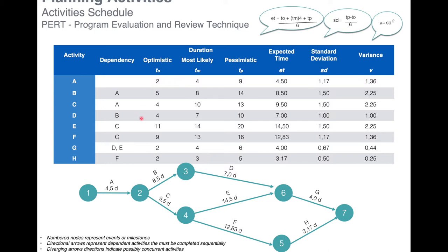We do exactly the same exercise for all activities: most likely, optimistic, pessimistic, expected time, standard deviation, and variance. Activity A has an expected duration of 4.5 days, Activity B is 8.5 days, Activity C is 9.9 days, and so on for all the activities in our project.